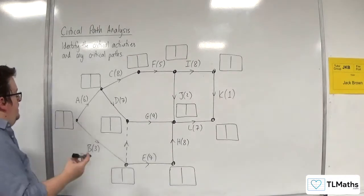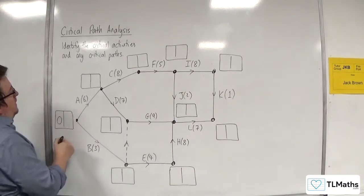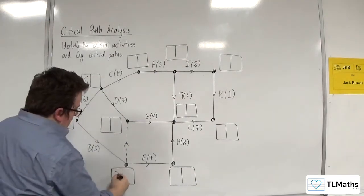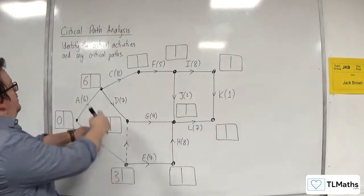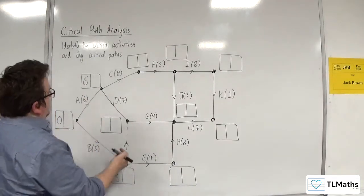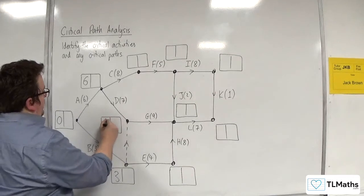So we're starting over here, so that'll be 0. Then we're going to have 6 in there, and we're going to have 3 in there. So for this box, we've either got 6 plus 7, so 13, or 3 plus 0. So we take the larger, so that's 13.